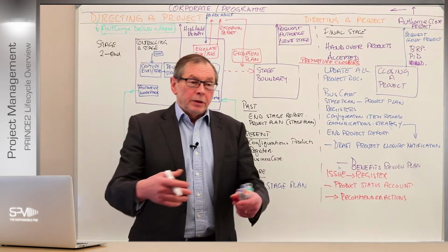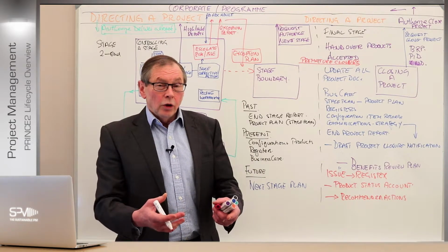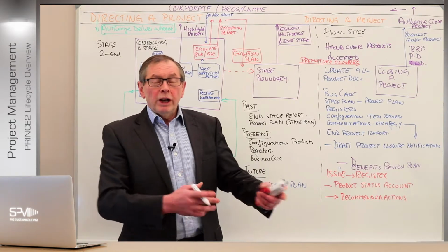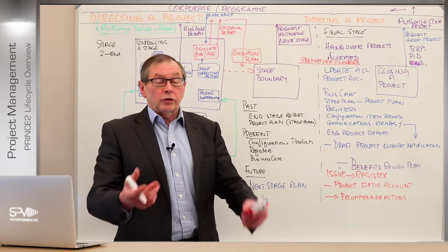Recommended actions from here. For example, if you've got something in the middle of being done, you've got to decide what to do with it. Do I complete it or not? Stuff that's done already, what do I do with that? Do I store it for possible use at a later date, or can I just scrap it, for example?